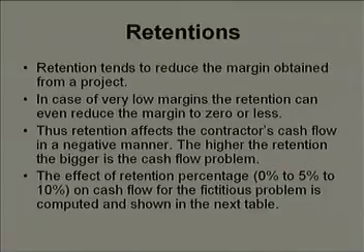Then I will assume a margin of 10% on cost. So, my margin for the first month would be 10, for the second month also it would be 10, and it will go on till month 10. If I add my cost and my margin, this gives me the gross value of bill, which for all the 10 months would be equal to 100 plus 10, which is 110.